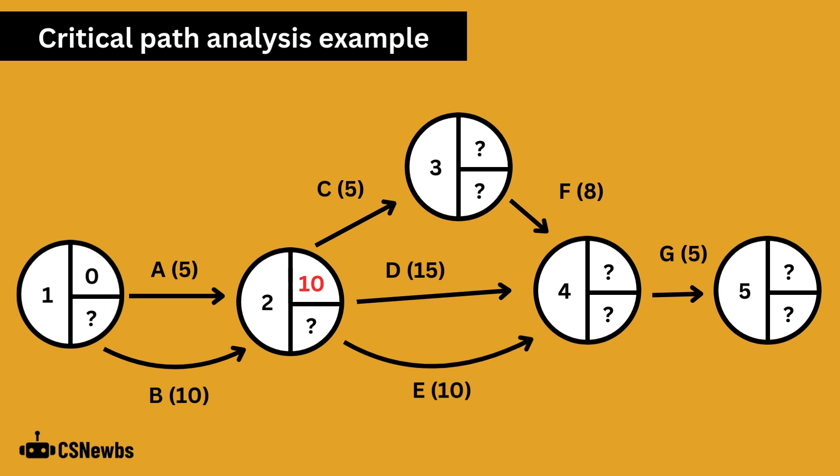The earliest start time of node 2 is 10 days, as it is dependent on both A and B being complete, and takes the value of the longest activity, which is the 10 days of activity B.